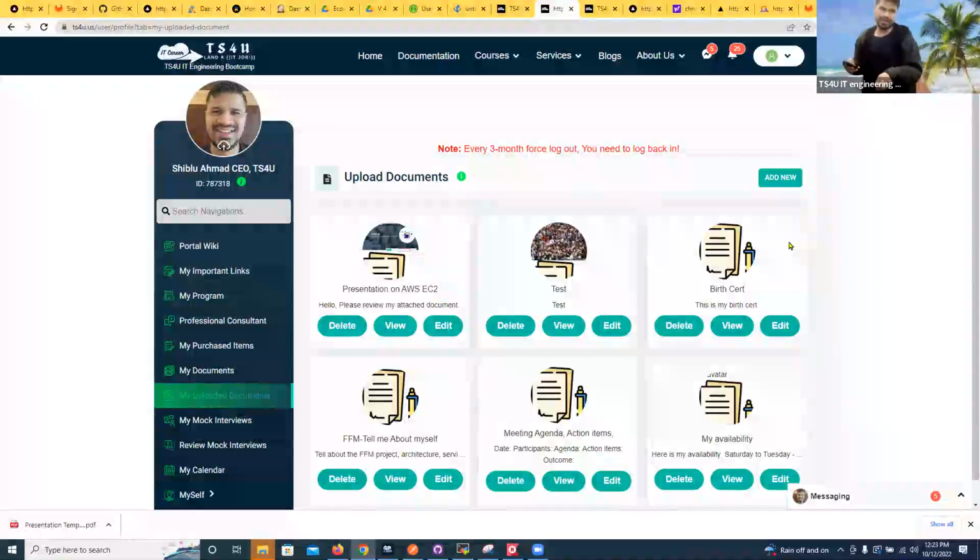From beginning to the end. Done. Done means actually done: development, deployment, testing, deployment to the test environment, deployment to the staging environment, deployment to the production. So it depends. If the user story is committed only for the test environment, not the production,